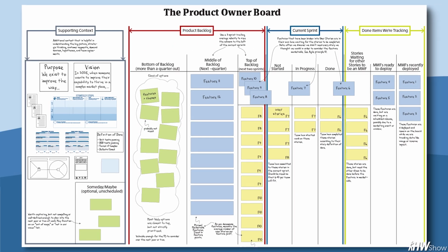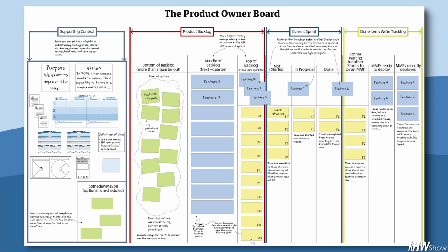Okay, the second way that we've seen teams benefit from combining Scrum and Kanban is with our PO board backlog model. It's a Kanban system for the Scrum product backlog. Work flows from ideas on the left to completed work in production on the right. We limit work in progress in the backlog at different levels of detail, so backlog refinement emerges just the right information just in time. You can learn more about that in our PO board episode, which we'll link to in the show notes. So that was Kanban sort of around Scrum.